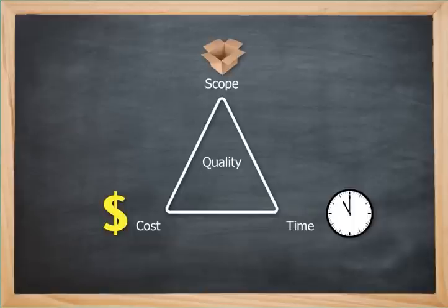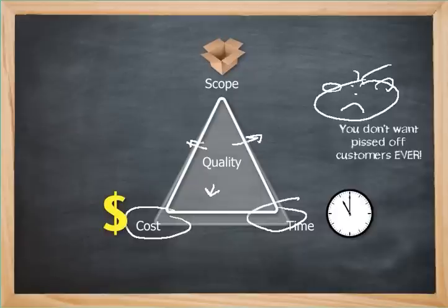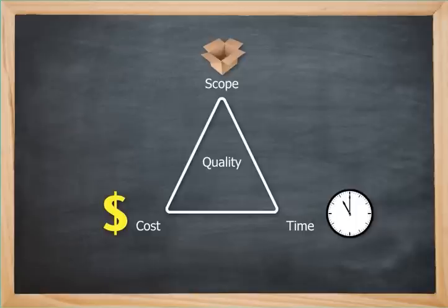A typical example of what can happen, especially with quality, is where a project isn't passing quality tests. So the PM basically adds more quality tests along the way. According to the Head First PMBOK, you'll find that your project is either late, it's over budget, or lastly, it's unacceptable to the customer. And you can see the relationship that quality can have with respect to scope, cost, and especially time. How does this relate to the PMBOK guide?